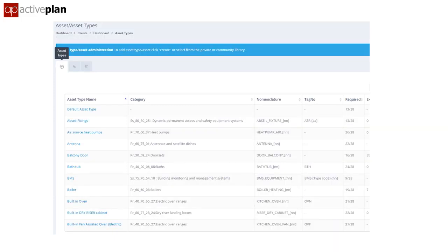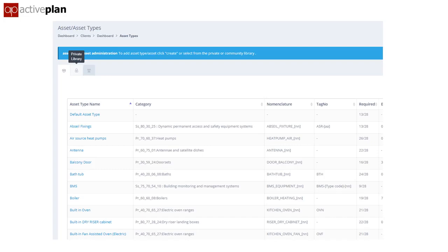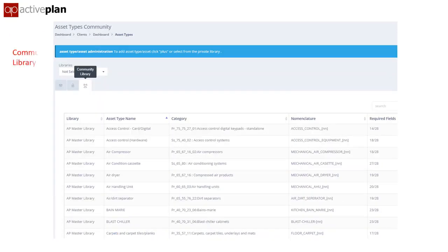So we have complete libraries of asset types, all connected with the correct Uniclass definition and their golden key reference. Having done all this work for one project, the team can add these libraries to a corporate library for colleagues to use on other projects, reducing waste and improving quality. The AIR network extends beyond individual projects and companies to enable firms willing to collaborate and share their standard libraries with others in the same sector — residential, education, health or commercial.